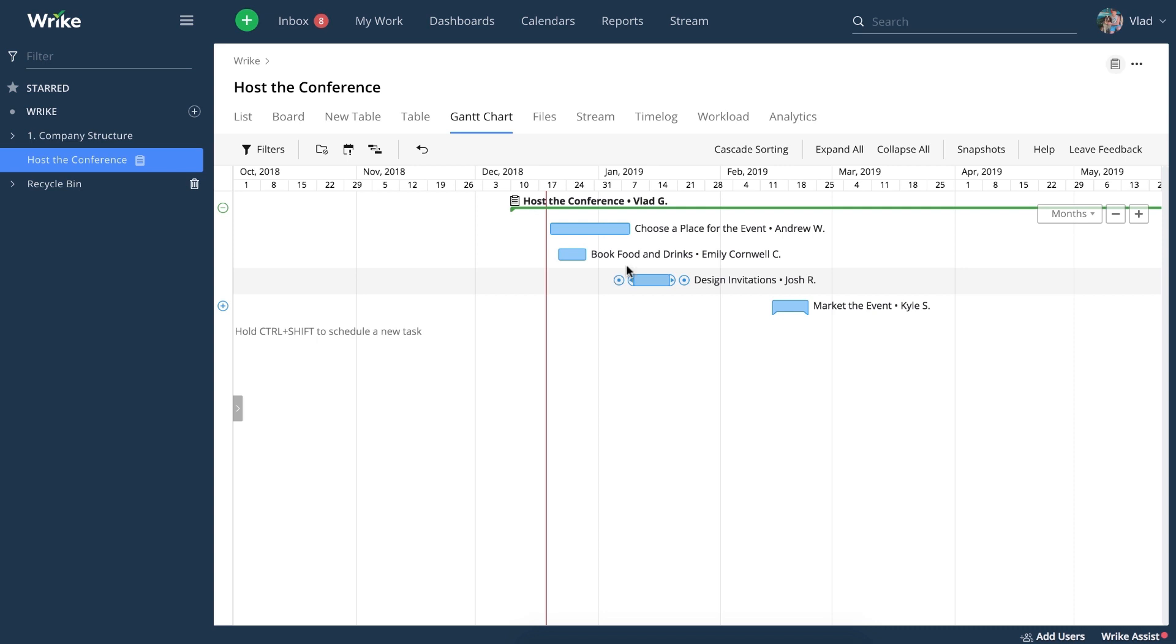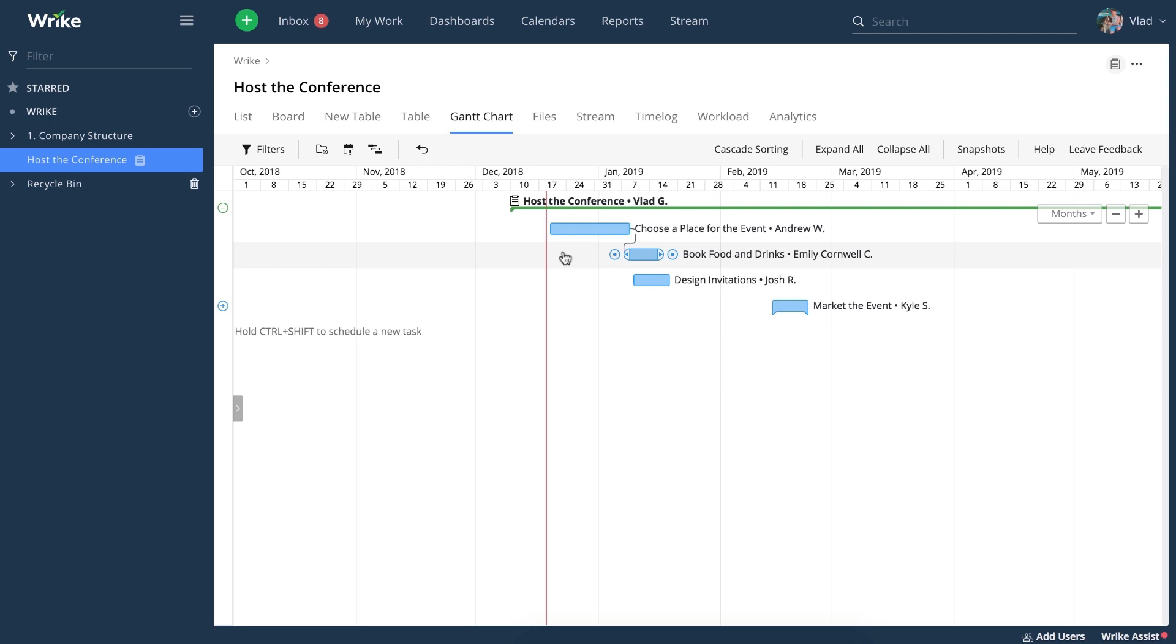Just click on the first task and drag it to the beginning of the next task. Now you'll know that you need to start working on this task right after this task is completed.